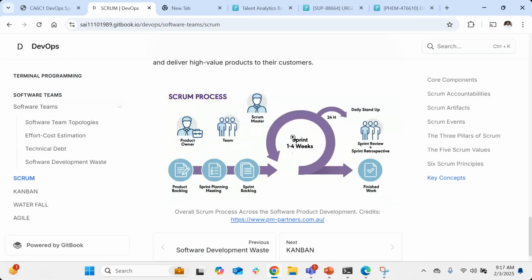Now in the 2 weeks they will build and develop the feedback, but at the end of the sprint they will do a review. What review do they do? They do typically a retrospection. What retrospection do they do? Did we plan well? Was our understanding of the feature correct? Did we release it correctly? Do we have any challenges with the other teams? All that discussion they do after the sprint meeting. So these sprints are cyclic in nature.